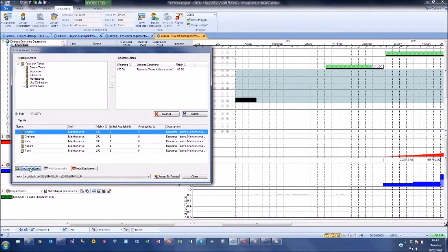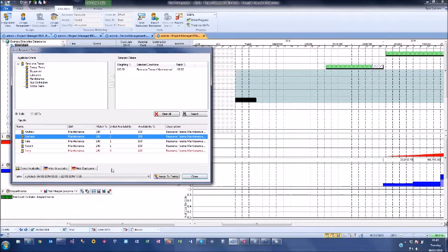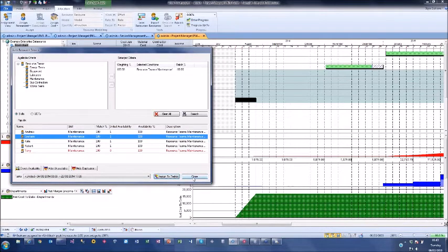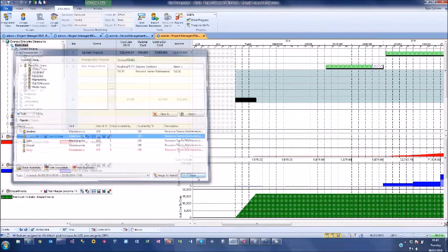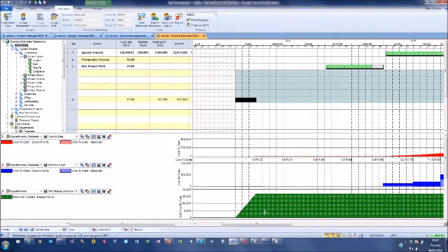And then the power here is I can check the availability. So I have the availability and see that all the top 4 are available, and I can say Graham is going to be assigned to that task. And I've just assigned Graham. Graham has a cost rate, so that has now just created a cost and income on my projects.